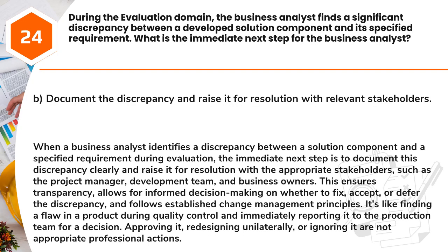Answer: B. Document the discrepancy and raise it for resolution with relevant stakeholders. When a business analyst identifies a discrepancy between a solution component and a specified requirement during evaluation, the immediate next step is to document this discrepancy clearly and raise it for resolution with the appropriate stakeholders, such as the project manager, development team, and business owners.